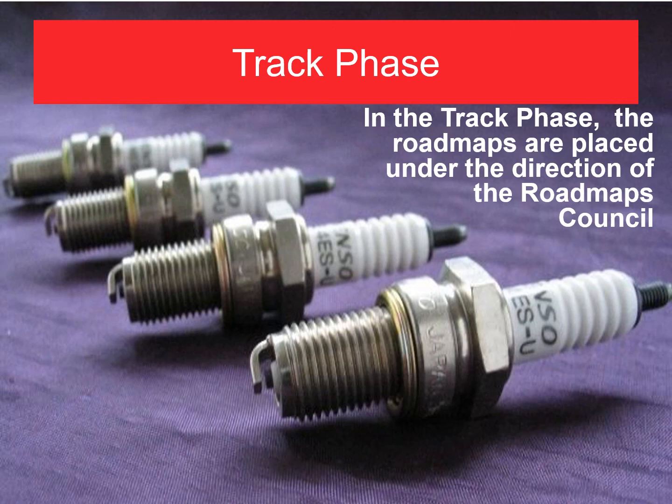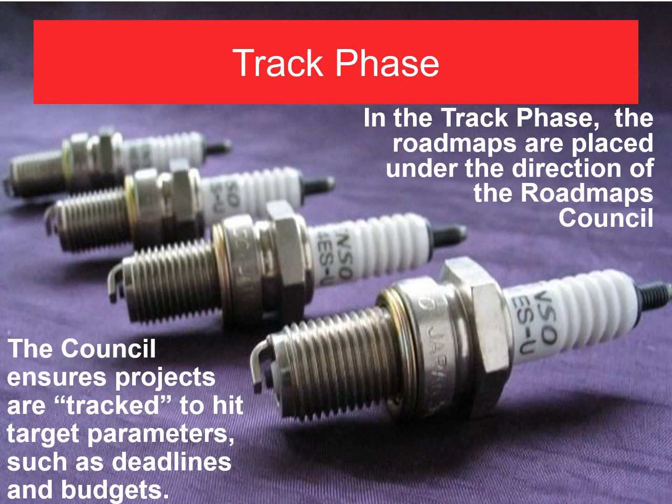Now I like to describe the Roadmaps Council as being very similar to a project management office, where the projects within an organization are centralized into one location. Well, in this case, the roadmaps are essentially centralized together with the projects involved within those roadmaps, such that a body of managers representing the various organizations collaborate and work together to try to ensure the success of those projects. So the council is charged with essentially ensuring the projects are tracked to hit the target parameters, such as the deadlines and certainly the budgets.